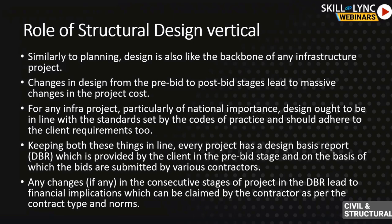We also take help from IRC — Indian Road Congress codes — like SP special publications or IRC-6 for loads, but the main codes are the Indian Railway Standards. Sometimes there are conflicts between two codes; in that case, we go with whatever the client requires. Every project has a Design Basis Report, DBR. The DBR is prepared for each and every project, irrespective of cost — it is like a bible which you have to follow, provided by the client in the pre-bid stage.